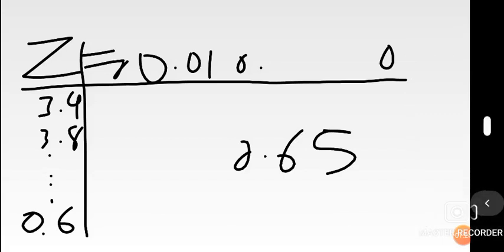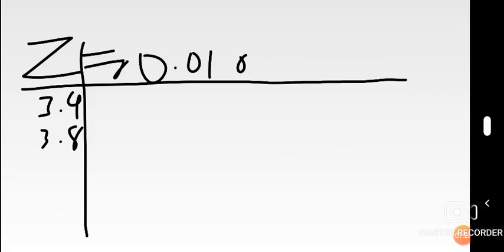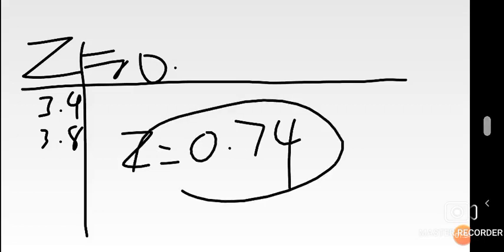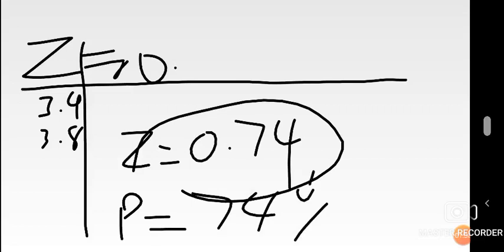And you find that, as in our example, the z-score gives 0.74 something. I'm just rounding off somewhere there. So if they ask you, what's the probability? The probability is equal to 74%, because that's the value that you found at that point. And then you've answered. So basically, this is the PERT method of how you can determine the critical path.